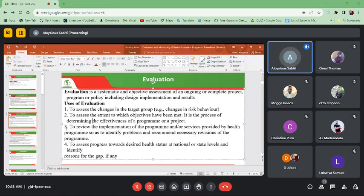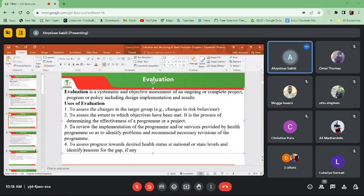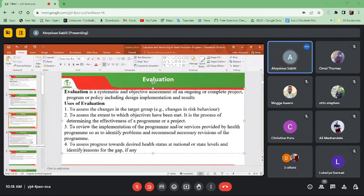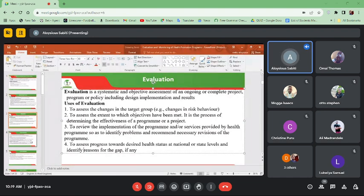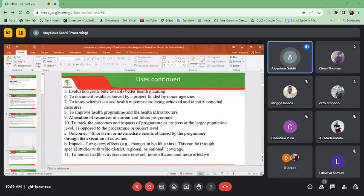A fourth use is to assess progress towards desired health status at a national or state level and identify reasons for any gap. For example, if the desired outcome was 100% deliveries at a health facility but evaluation reveals you are at 85%, you should be able to identify reasons for the gap and recommend key interventions. A fifth use is that evaluation contributes towards better health planning — through having information, we can plan better in our health systems.